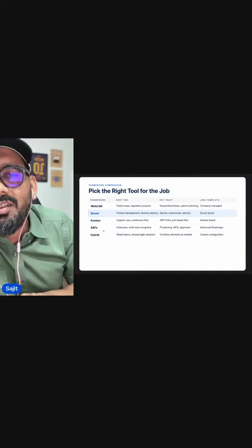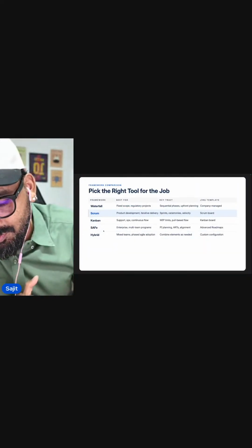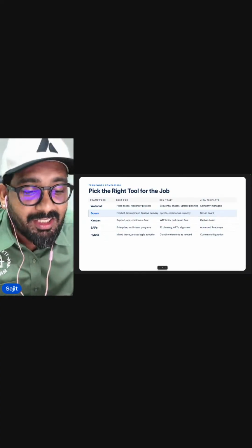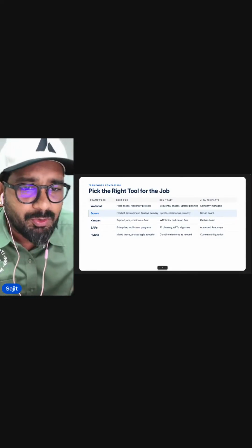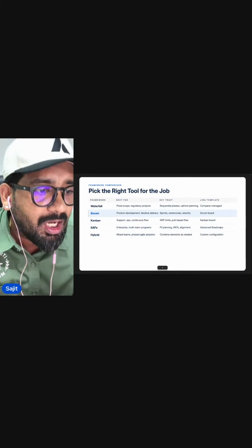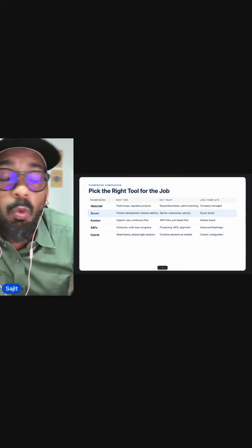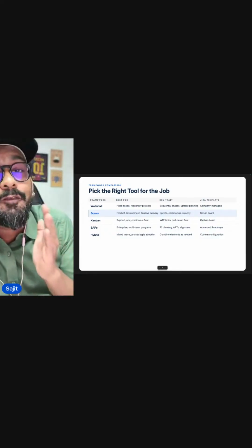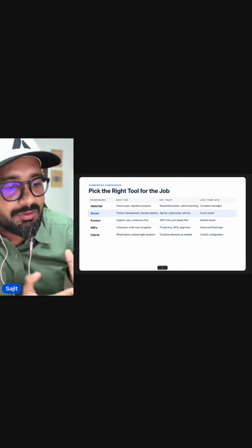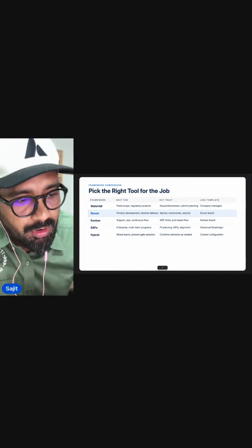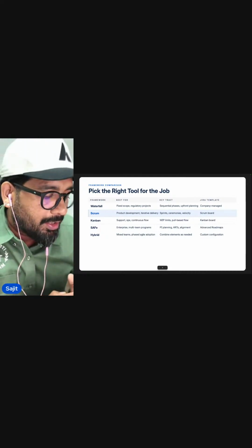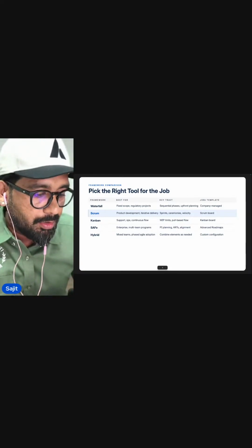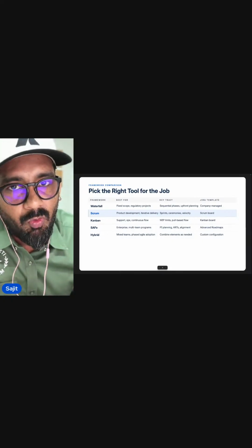All right. Let's look at what are the tools that you have available. So, Waterfall, of course, the PMP methodology, the first and foremost methodology that started it all, I would say, is the first one that you have right there. So you can start with the waterfall model. What is the waterfall model? Let's start from that. What does the waterfall model say? If you have fixed scope and a project where you might want to do some regulatory work, if you know exactly what you're building, and you're in a model where change is expensive, right? Waterfall is the model that you would want to pick.